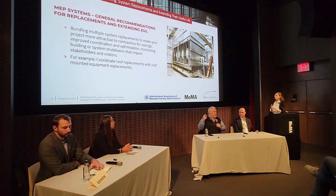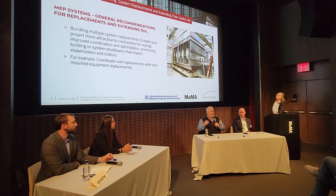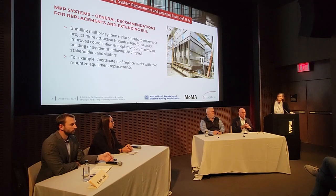So Richard was able to repair his cooling towers and lengthen them out until the end of useful life of his roof. Yeah, we've been refurbishing a couple of towers. We have eight cells, and we've done about one to two cells a year for the last couple of years. We do it on an as-needed basis, and we replaced the drift eliminators and have done some other work. But again, that's just to try to get these towers to make it to the point where they can be replaced in a phased, planned migration from our 2004 technology to our 2024 technology.